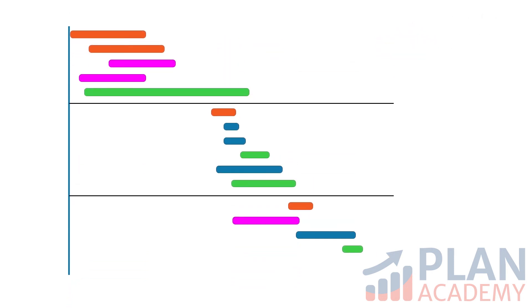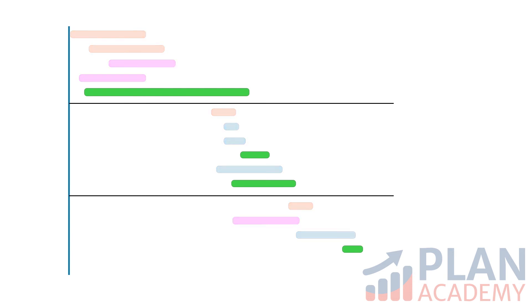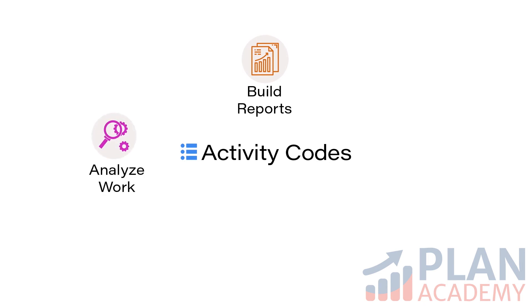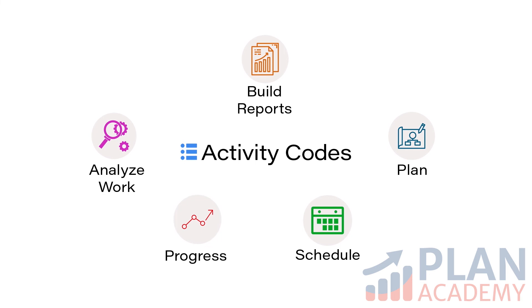And when you want to get fancy, you can do this: show me the work my subcontractor is doing in Area 1, related to Contract Item D. With Activity Codes, you now have the power to slice and dice your activities, to build reports, analyze work, and facilitate planning, scheduling, and updating.